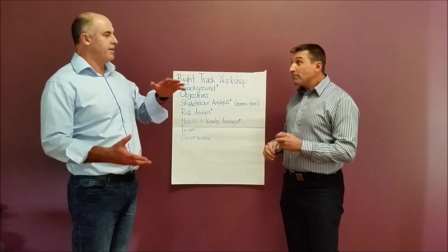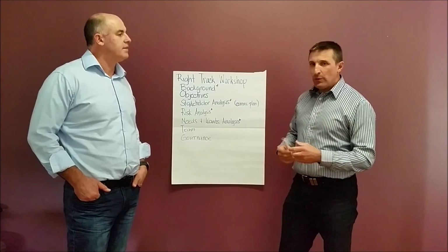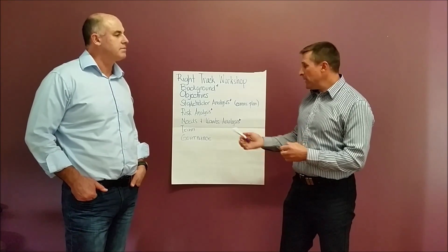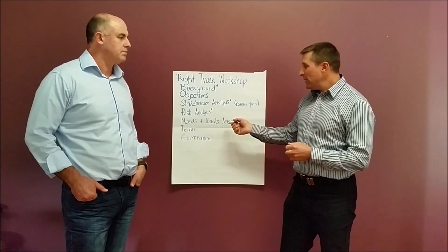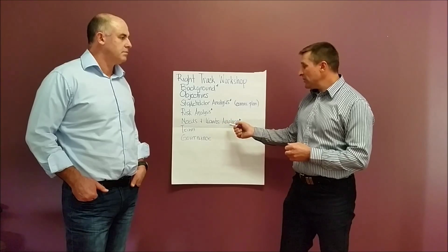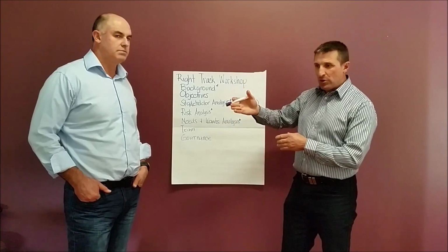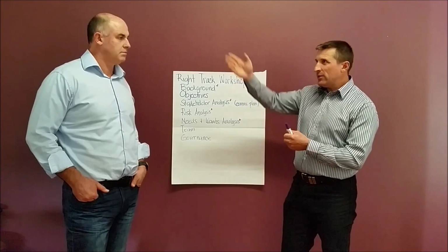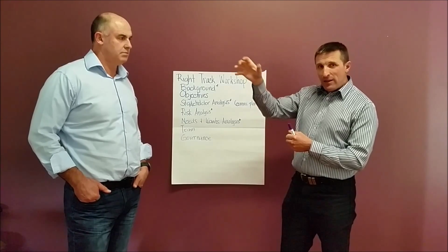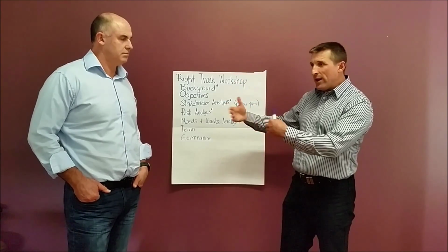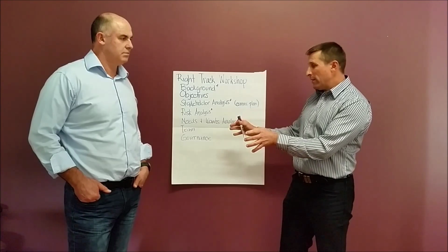And how do you use the ranking? So later on, yeah, the rankings are used for, we've got a little template that we use for this, but it's basically like a weighted analysis, so that when you score things against that, if you're looking at an option or a scenario, you can say, well, how does this one fit those different rankings? And then you score them against that, and it'll give you a weighted attribute type answer. So it'll say, oh, that one scores better than that one.